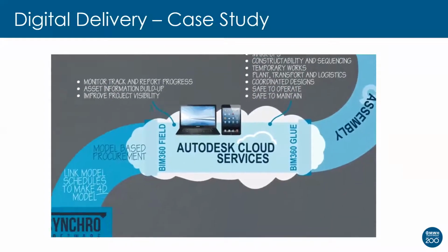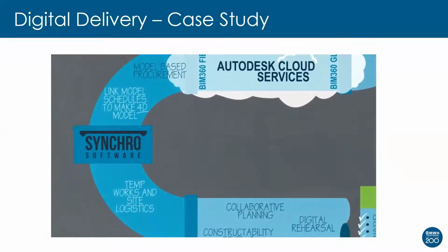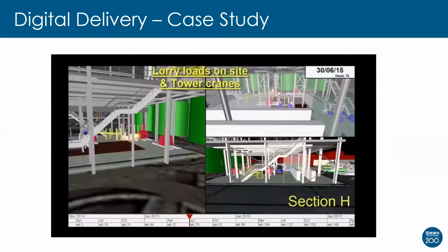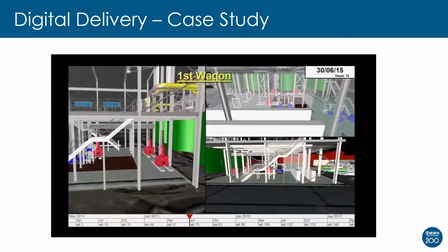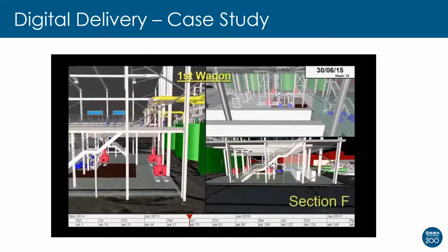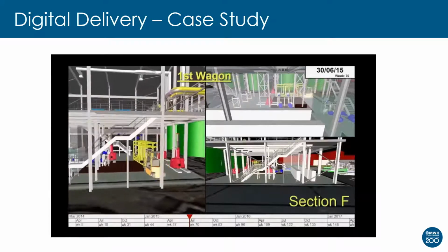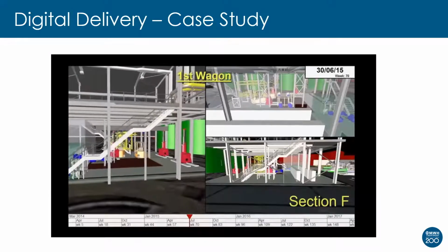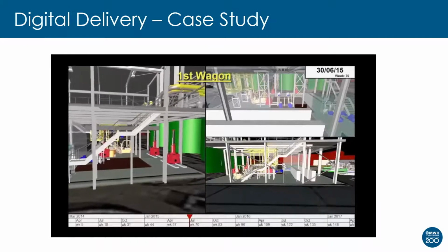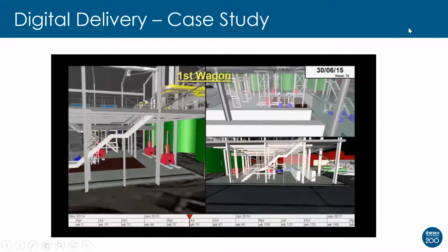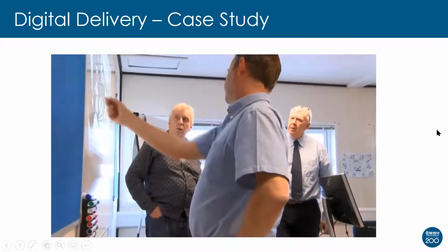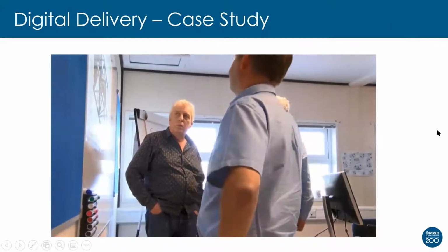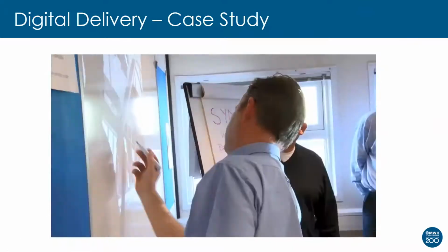Right the way through from design through to our supply chain, we've taken this a step further with the 4D planning software, and we've had dozens of sessions with our supply chain where we digitally rehearse installation sequences, making them a lot safer. In the safety of a classroom, we can really thrash out some of the hazards that may be faced on site and deal with those before the guys get to site.